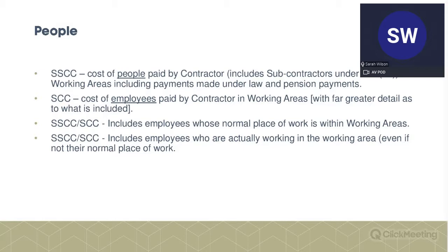So I think rather than getting into the detail too quickly, the easiest thing to look at here is that we're pretty much looking at the actual cost of each employee. So if you think about your cost to your business, you'll get your pay slip every month, hopefully, and it'll be your net pay, but there's also the tax paid, so it's your gross pay basically. There's also employer's national insurance that is paid by the employer for you, which is over and above your salary. So that's an extra. There might be a pension contribution.